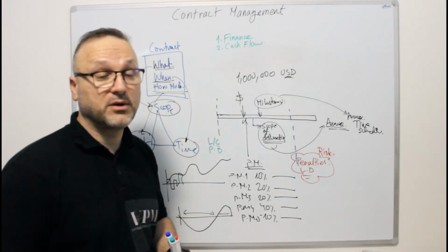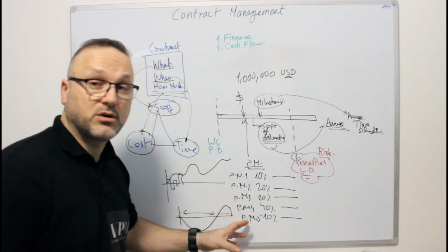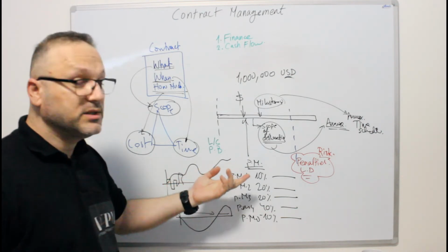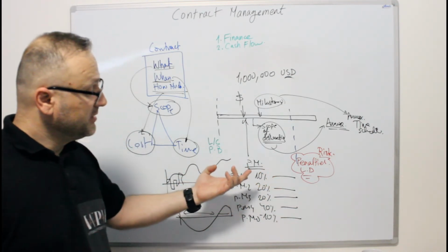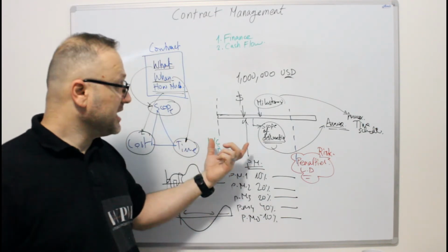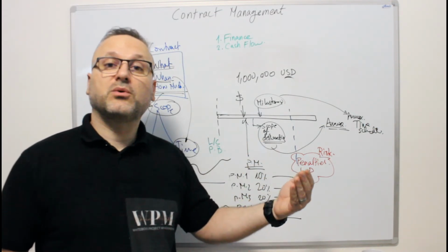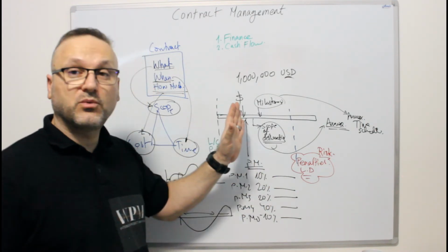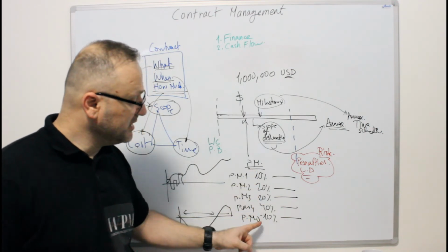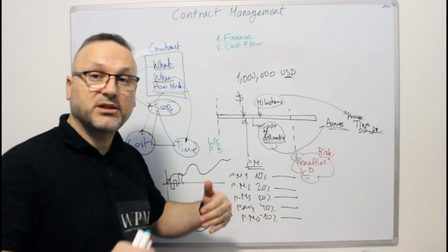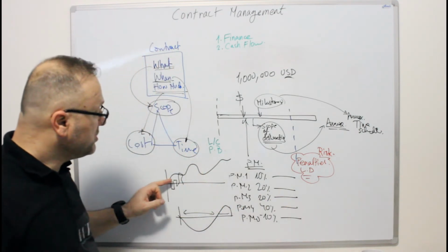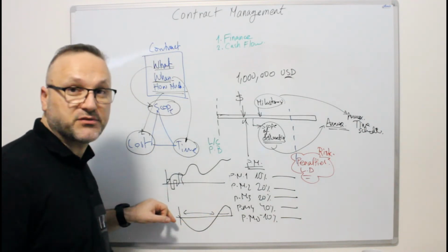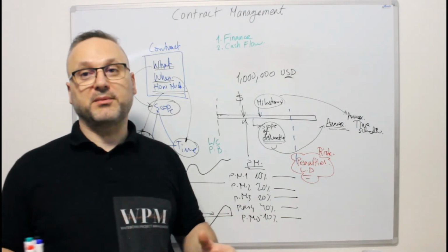That depends on your contract. The best contracts are set with positive cash flow. That means you will get paid an advance payment to start, against some performance guarantee, and you start your work. Once you start getting the payment milestones from the client, you pay back your suppliers, and you keep your cash flow positive. Avoid negative cash flow. Negative cash flow always leads to problems.